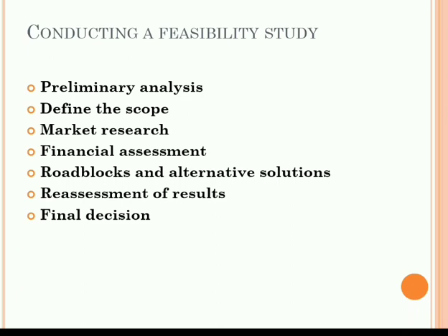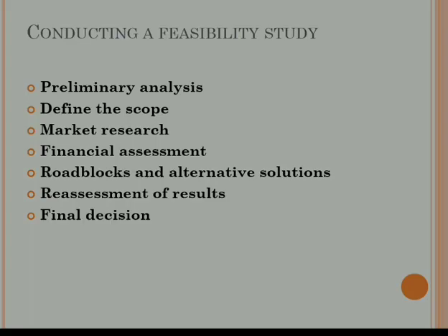Here we have to include setting up steering committees or national preparation teams. Then the results of identification work should be summarized in a report, project brief, or a concept document, the format of which will depend upon the government's or the financial agency's requirement. This is all about the project identification.